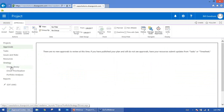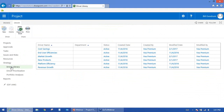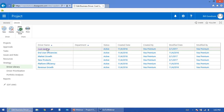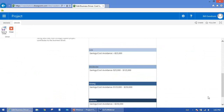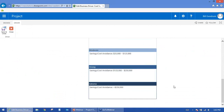Going into the Portfolio/Strategy side — only the Premium license has these capabilities. The system is organized around what they call Drivers, which represent your strategies, objectives, and business drivers. You define what those drivers are for your organization, then describe different levels of impact. For example, for the Cost Savings driver, low might be saving less than $25,000, with categories ranging from low, moderate, strong, to extreme. You create concrete descriptions so everybody agrees on what 'strong' or 'extreme' means based on defined criteria.